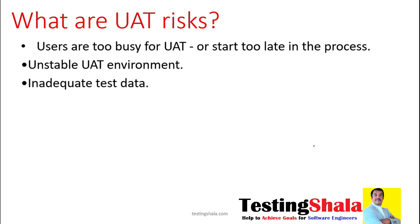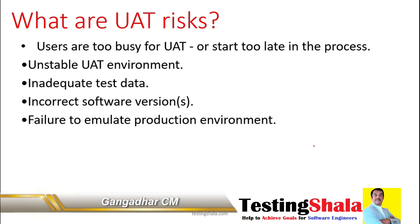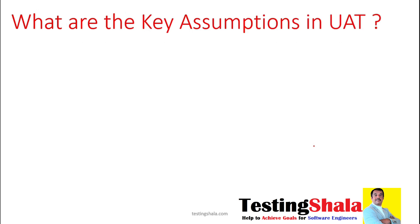The fourth risk is incorrect software versions — especially when there is integration or when multiple software versions are being integrated, we may see this risk. The fifth risk is failing to simulate or emulate the production environment properly, which sometimes causes a lot of failures. There is also a lack of human resources, since performing UAT requires people with both business process knowledge and functional knowledge, and getting that kind of resource is not easy.